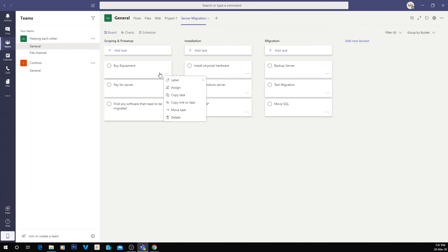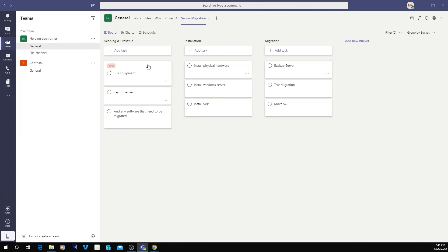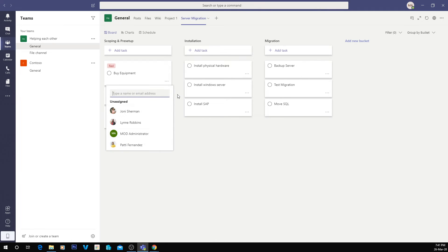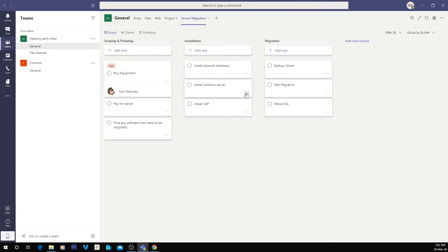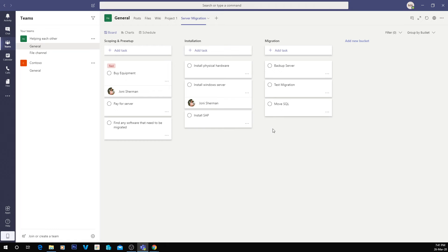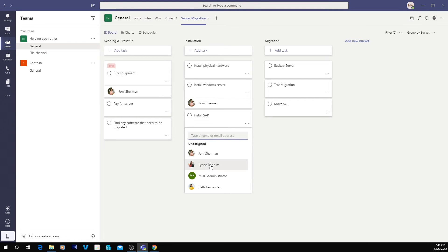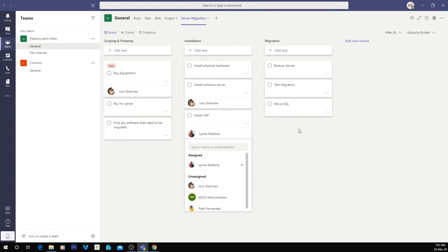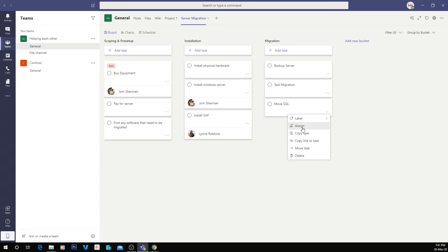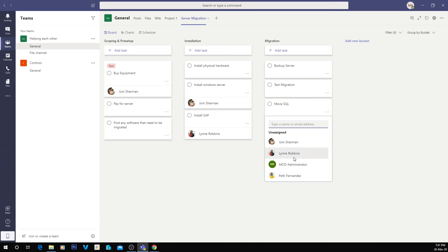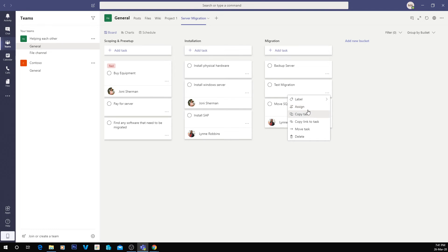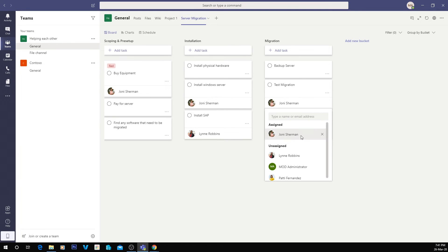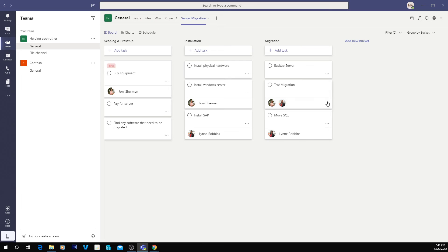So if I click these little three dots here, it gives us some options. You can either choose to put a label on it to give it color codes, but what we're going to do here is assign it to someone. So I'm going to assign it to Joni, and I might also assign installing Windows Server to Joni, and maybe our SAP administrator is Lynn. She also knows how to move Windows SQL Server. And we might do a test migration, will be both Joni and Lynn. So now you can see some of these are allocated to different people.